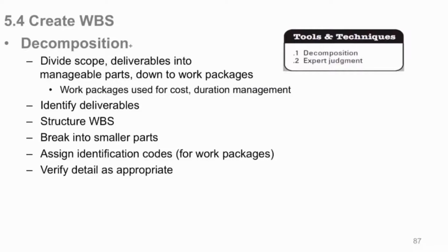And that work package is used to aggregate cost and duration that is reported upwards in the structure. So that's how you aggregate your cost, your individual activities into many work packages that roll up finally into a deliverable item. So decomposition identifies the deliverables specifically, and breaks them down.